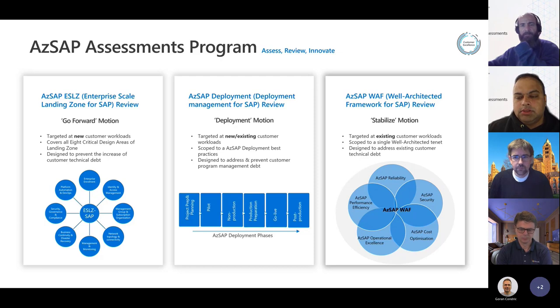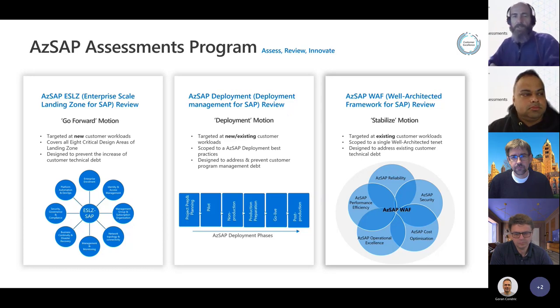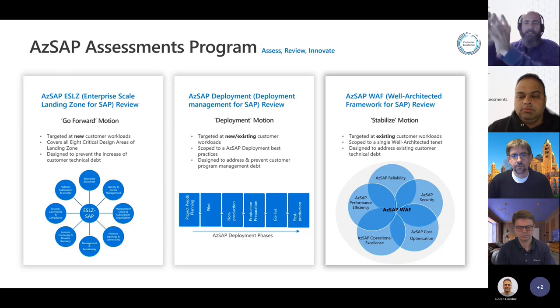Now, to gain the best benefit from these checklists, there are a few things to consider and plan before you just dive in, either as a customer or a customer and Microsoft in partnership, and start running your projects. Firstly, you need to understand how our project milestones or phases typically map to that of the customer. We talk about things like a pilot phase, a project prep and planning phase, and a non-prod phase. Some customers might say, well, we're in development, or we're in our testing phases, or we're in pre-production, or we're busy doing user acceptance testing. So there's a rough map of how our phases will typically match to those customer projects.